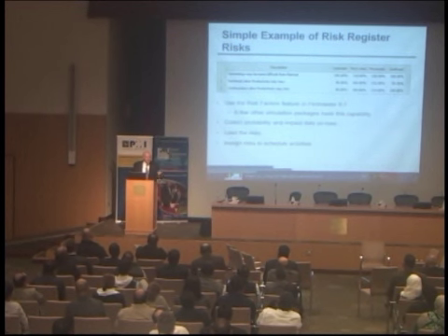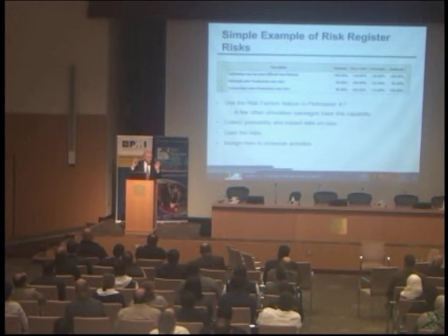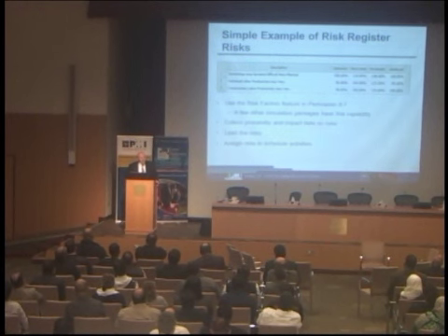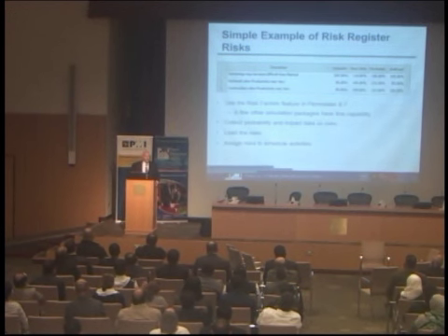Number one, nobody believes that. Nobody believes the IPA number because that's based upon an assumption that they don't agree with. And the risk analysis showed that it was only 5 months beyond that, but they didn't like it. So they threw the report in the trash can. They paid my fee. As those of you who are consultants, you understand that's the most important part. And then, about 6 months later, one of the risks that I had insisted on putting in there over their objections occurred. And they'd already lost 6 months. I was right, they were wrong, but they couldn't see it because they were blinded by the fact that their schedule was 32 months when really even their own people thought it should be 40.